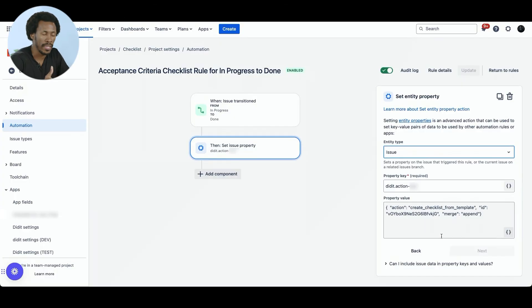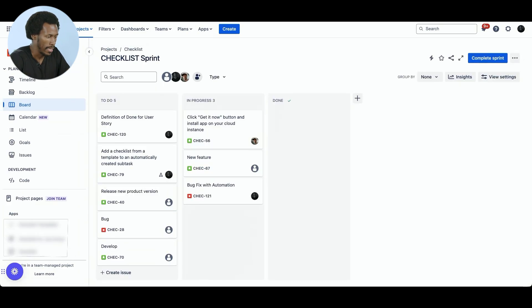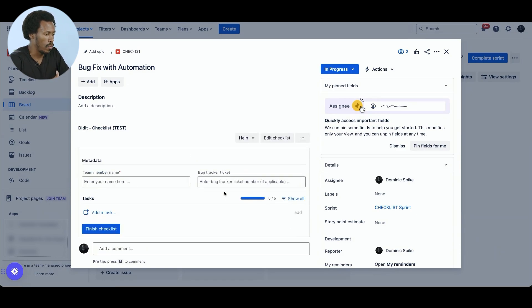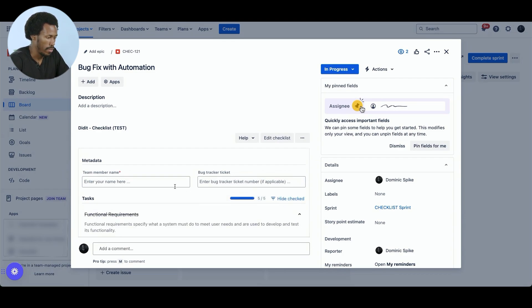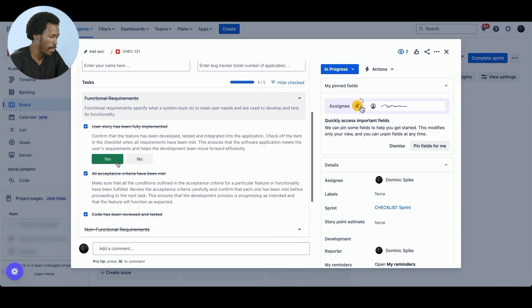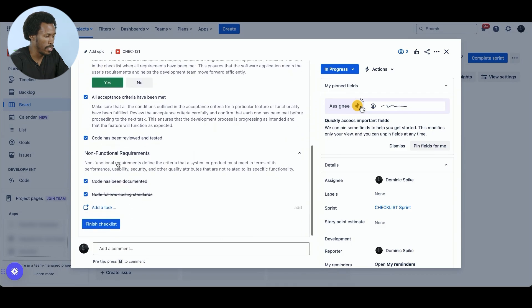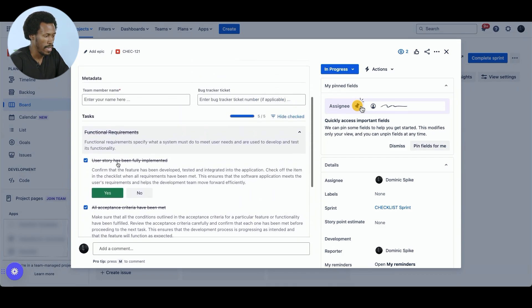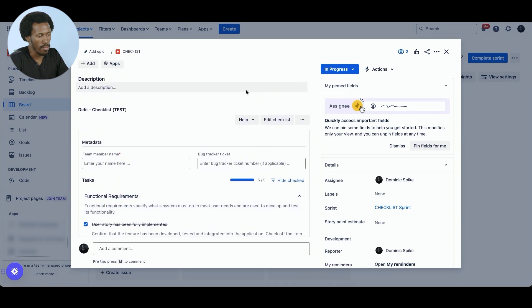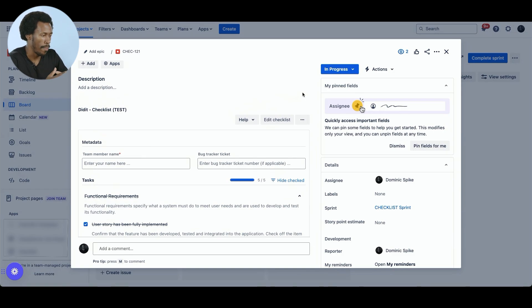So let's do that and update the rule. Okay, so let's see this in motion. I'm going to head back to the project board. And here we already have a task where the definition of done is set up and we want to add or append the acceptance criteria. So we have already the functional requirements and non-functional requirements already checked off. And once we move the status of the ticket from in progress to done, the expectation is that the acceptance criteria will be appended to this task.